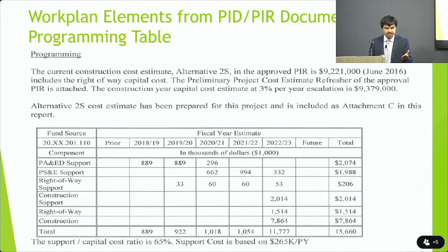As you heard in the last 2 days, if you want to change the timeline, you have to do time extensions. If you have to do budget changes, you have to do G12s, supplemental funds, PCRs, in that order. For the future phases, you do the PCRs. For the current phases, you have G12 and supplemental funds. Those are the only 2 options you would have.